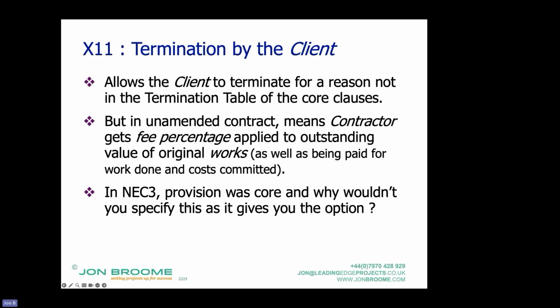My view is, why wouldn't you use this option if you're a client, or specify this option? It just gives you the option of terminating the contract if for some reason you've decided you're throwing good money after bad. You can still terminate for all the other reasons. You don't want to use it, but it gives you the option. Otherwise, you haven't got that option. So all the NEC4 contracts I've been involved in, we've specified it, because why not? It gives us the option.